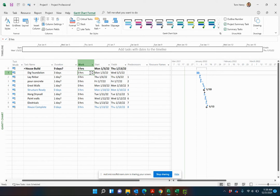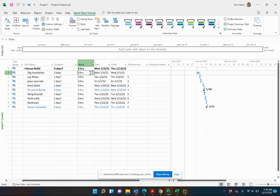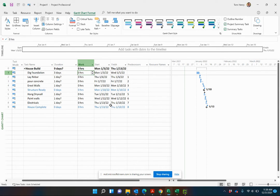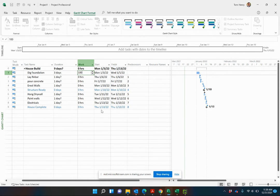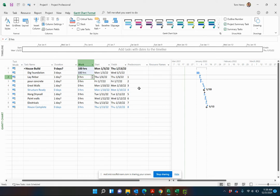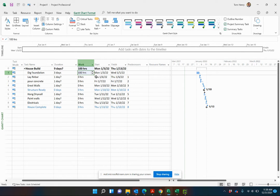The first thing we do is estimate duration and how much work. Let's leave the resources out of it. To dig a foundation, it's generally a crew of people and it takes them 40 hours for a week. If there's a crew of people, it's going to be, let's say, three on the crew. It takes them three days. I estimate that the effort for that is probably around 100 hours of actual labor. If we have 10 people working it, they could get it done a lot quicker. So if it's just one person, it's going to take them two and a half weeks. So we come in and estimate the work at 100 hours.